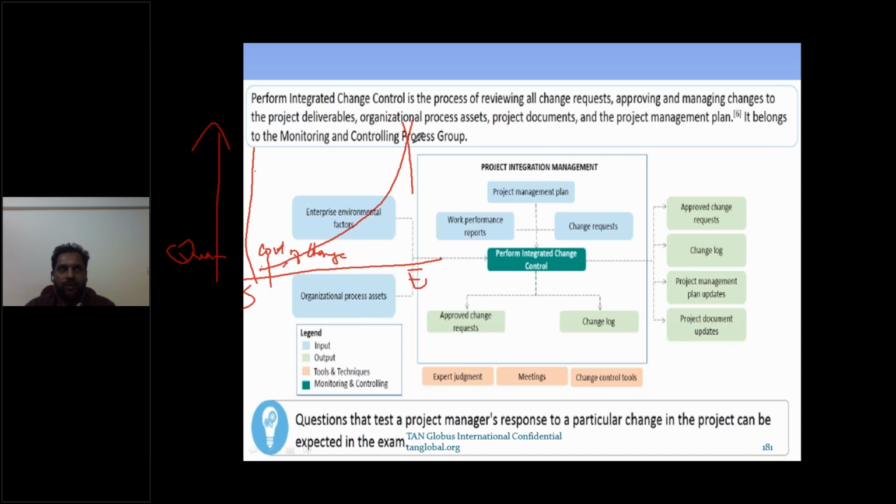For example, just see a 12th floor building. When you are taking possession, now ask the builder to make a small change. He will give you a very high cost because I have done it. I have taken three flats, and one of the flats I wanted to customize, a very small customization. He asked me lakhs of rupees. He said, if you would have told me earlier, I would have done it at a smaller cost, but now it is a huge cost because it's a structural change. You have to break some things and add new things, and think about how other things are getting impacted.